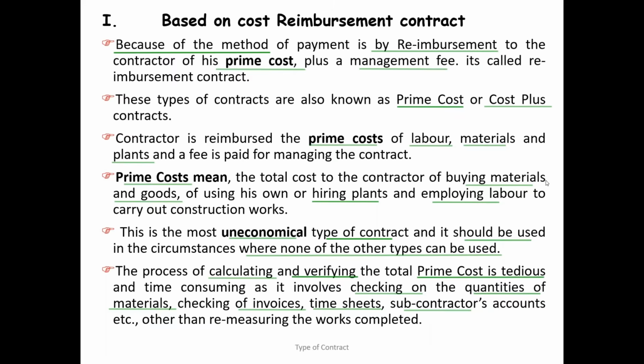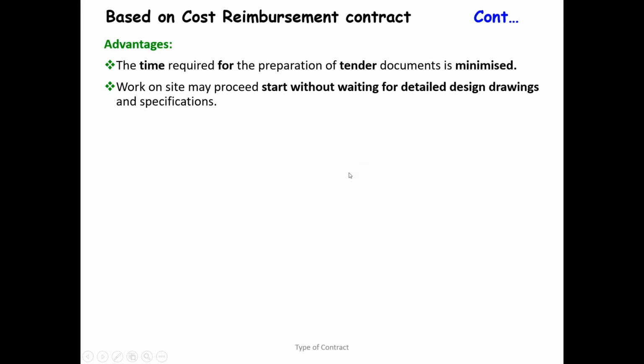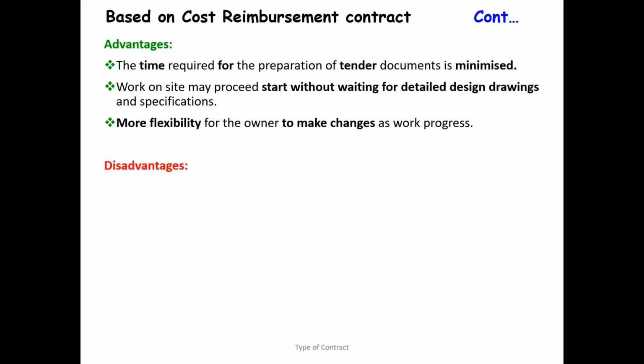Okay. So now this is the way it works. So what is the advantage? You don't need to wait for BOQ preparation. You don't even need to have the design completed. Straight away you can start the work. So it is very fast. You don't need to argue about design changes or variation. Whatever cost is incurred, you are going to pay. So therefore, it is not like a measure and value contract.